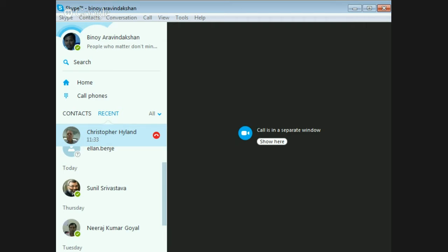So 2 apples cost so many rupees, and 1 orange costs so many rupees, and that's the value of the work we've done out of perhaps the overall requirement for 100 apples and 50 oranges. That's how progress is measured in terms of cost. It is also measured on an individual basis.